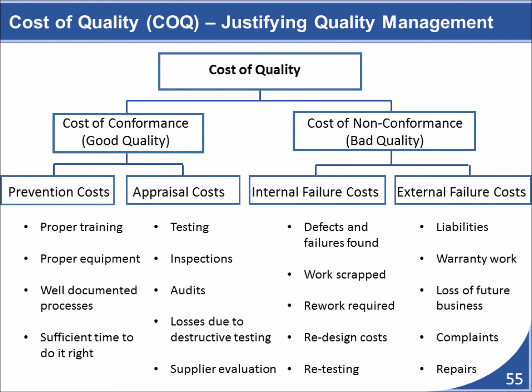When considering the cost of quality for an organization, you need to consider both the cost associated with implementing and maintaining a good quality management system, as well as the cost savings that will be encountered by having such a system in place. Most organizations find that fixing defective products is a lot more expensive than building them right the first time. The same findings apply to projects. Fixing defective products after they are built is one of the most expensive ways to produce products. Consider this as you put together your quality management system for your project.